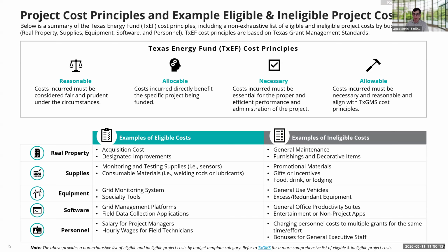And they'll also be based on, as I mentioned on the previous slide, what is already captured in your budget. Those will be the two driving factors for the better part of the reviews for disbursements moving forward. So if they aren't captured in your budget, you can anticipate it'll be a hard hill for you all to climb in justifying the need for the expenditure.